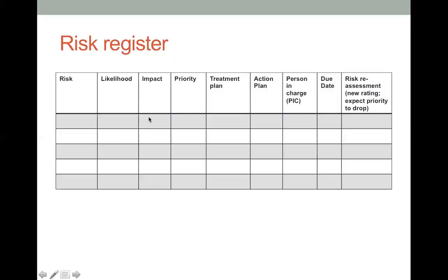And what is the impact if competitors reduce their price when we launch the new product? Well, the impact could be 4 or 5, quite high, right? Either 4 or 5. Let's say our sales management team advise us that it's quite high, and let's say it's 4. If it is 4, then the priority in here becomes 8, because we got the likelihood 2.